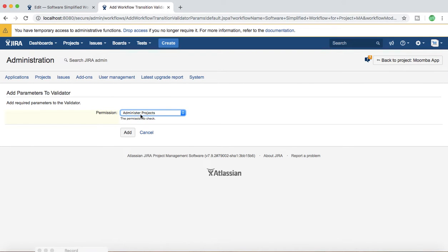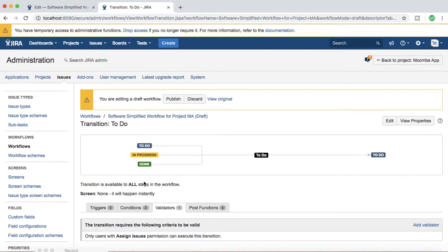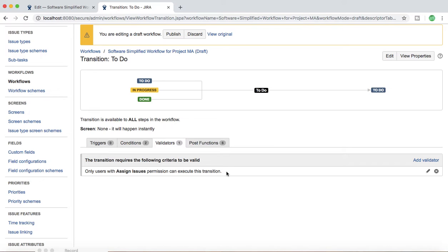For example, select the Assign Issues permission and click Add. What this does is ensure only users with the Assign Issues permission can execute this transition. If you add a validator, it checks between the transition from one status to another that only the person with the specified permission — in this case Assign Issues — can execute it. Similarly, there are many other validators available, such as screen validators that check whether values on the screen are present and valid before allowing the person to transition the issue.